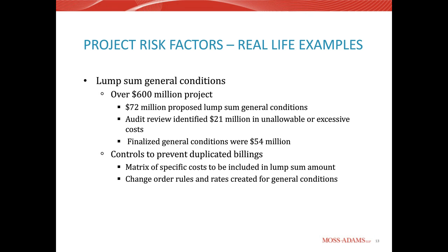It's probably maintenance, licensing, registration, items like that. It's not for the actual value of the pickup truck. So that's kind of what this one's getting at. If you do have lump sum general conditions, it's very critical to review those at the beginning and understand what costs are included in there, and what costs are included in the reimbursable portion of your contract, so you don't get cross billings.